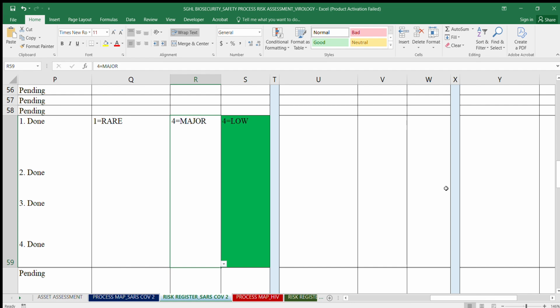But then if you do that, you find that your risk will reduce from a high to a low at the time of review. Okay, but then maybe after another 3 months or 6 months, you come back and you want to check again if this risk has been maintained. So you need to check the measures that you put up, right? Are they working or not? Are they continuing to work?